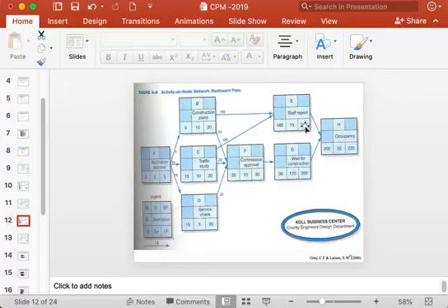If you allow activity E to finish after 200 days, activity H can start latest by 200 days, taking its own time of 35 days. It will finish after 235 days, so it will not delay the project. So that is why the latest time for E is 200, not 35. For E to finish latest by 200 days, it can start after 185 days. That means 200 minus 15, 185 days.